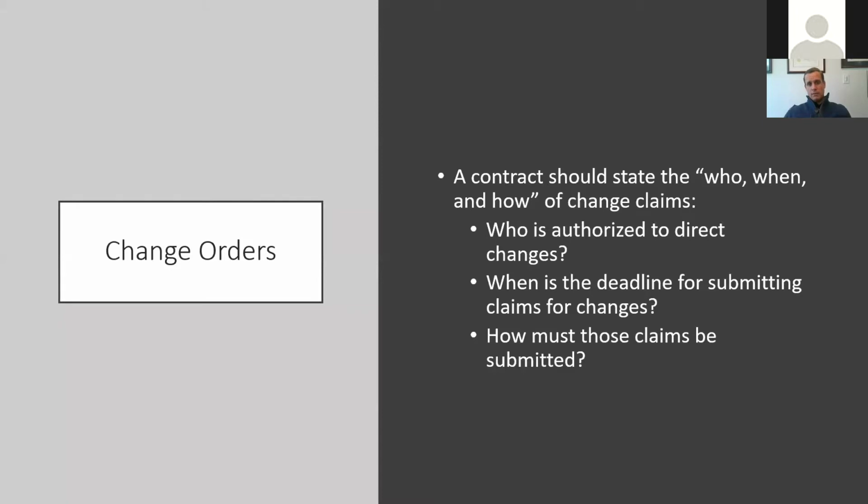And depending on whose side I'm on, if I'm representing the owner, I am putting very strong language in my contract that says, if you miss the deadline, you waive the claim. And a court's going to enforce that. Those of you that participated in the first seminar know that the court's going to look to that written contract. It's going to use the plain terms and meanings of the contract as to what the parties intended. And if it says waiver, the court's going to say, hey, you're out of luck. You waive the claim. Forget about who said what, when, and where on the project or what you were promised. That's not coming in. You have a written contract.